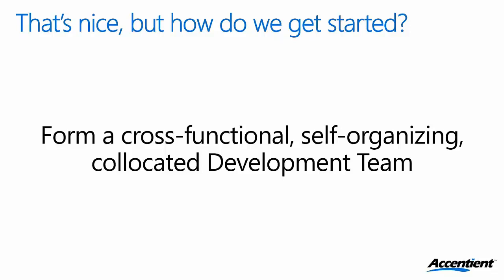So cross-functional just simply means you've got all the skill sets on the team that you need. You've got coders that can code in the different languages. You've got the testers that know how to run the automated tests and look after the test cases and the data sets and all of that. You've got your content developers. You've got your technical writers, your business analysts, your user experience designers, everyone that's going to be working on getting that piece of software done. Another way to put it is no one outside of this team will do any work on the software. There's not another group that looks after architecture, or another group that looks after testing, or another group that looks after user experience design. That's all on the team.